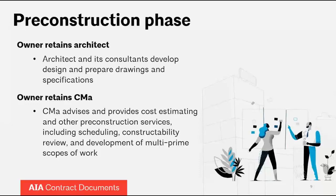During the pre-construction phase, the owner retains the architect, who retains other design professionals to help. The architect and its consultants develop the design and prepare drawings and specifications that will ultimately be used by the general contractor or trade contractors to build the project. The owner also retains the CM as advisor, who provides cost estimating, other pre-construction services, scheduling, constructability review, and development of multi-prime scopes of work if there are going to be multiple prime contractors on the project.